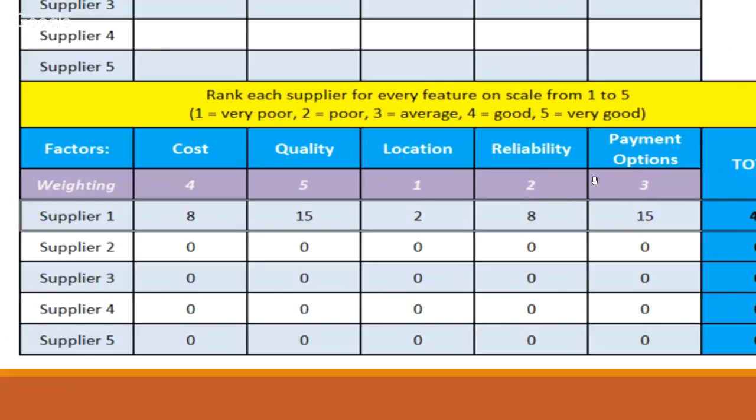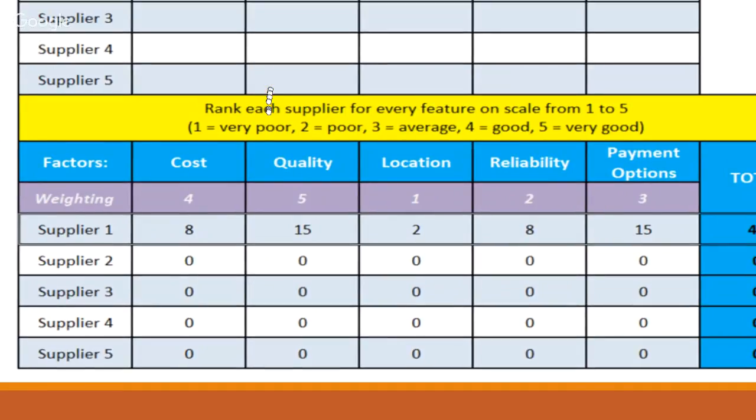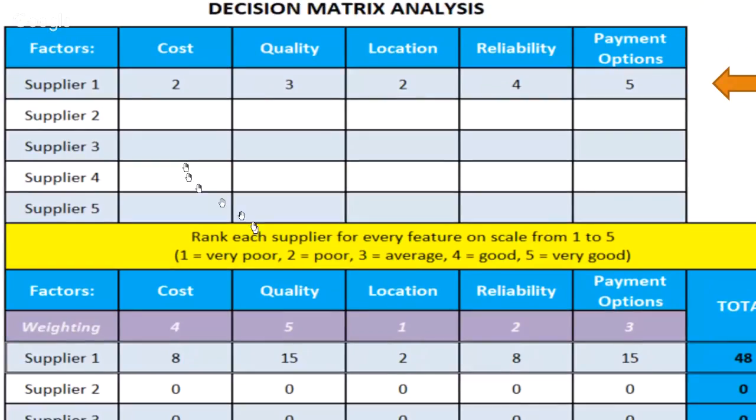It doesn't really matter. But anyway, what's going to happen here is, I have a look at this. All right, it's going to take my score here as a 2. It's going to multiply that by my weighting and give me a supplier rating grade. Okay, 2 times the weighting, 2 times 4 is 8. 3 as a grade on supplier 1 under quality. That's high. I've got my weighting as 5. 3 5s are 15. You can see what's going on here.